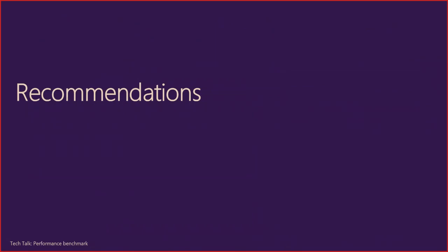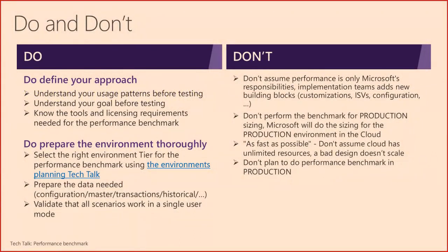A few recommendations as you're doing your performance benchmark. I said it already, but do define the approach thoroughly. Understand the usage patterns before you start doing the testing. Understand the goals of this performance benchmark so that you do it at the right time with the right scenarios on the right environment, and know also the tools and the licensing requirements that are needed. So for example, the Visual Studio licenses, and even if you want, for example, a specific environment, a tier 4, tier 5, that would be an add-on. And you need to prepare that.